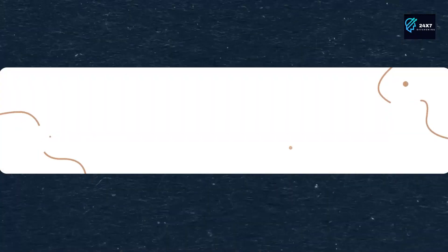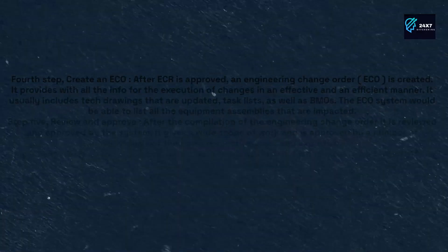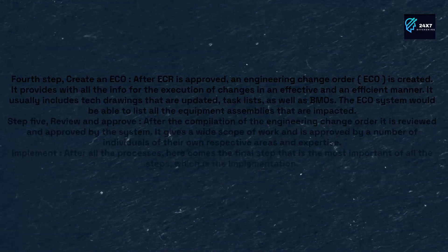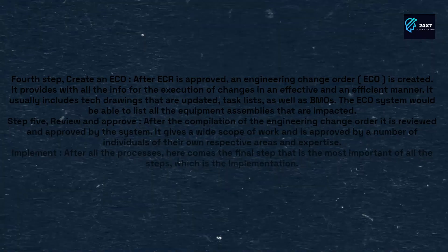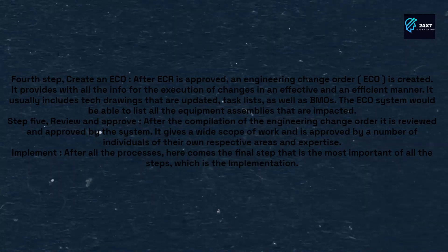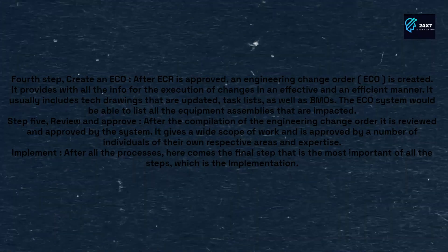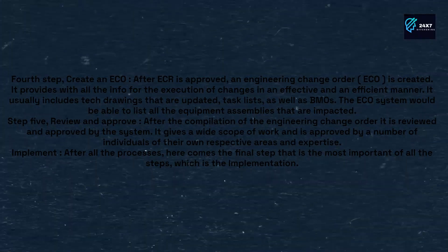The fourth step is to create an ECO. After the ECR is approved, an Engineering Change Order (ECO) is created. It provides all the info for the execution of changes in an effective and efficient manner. It usually includes updated tech drawings, task lists, as well as BOMs. The ECO would be able to list all the equipment assemblies that are impacted.